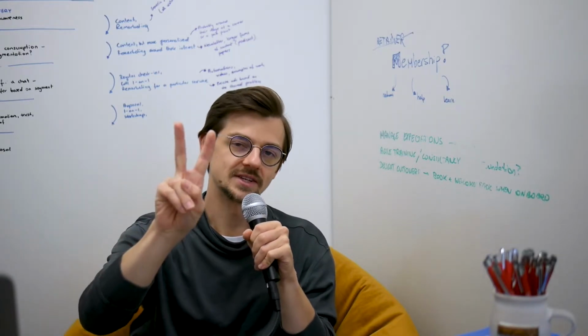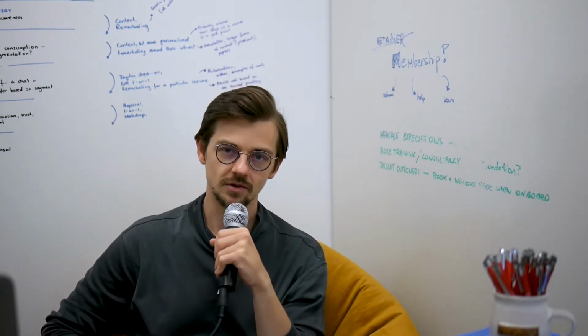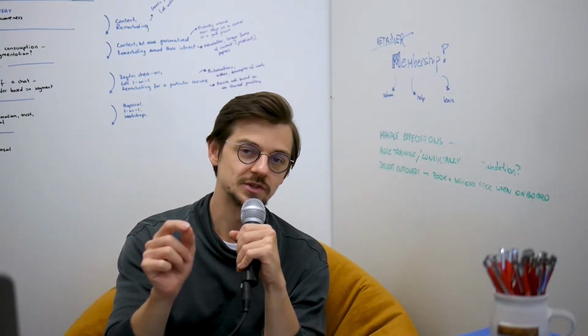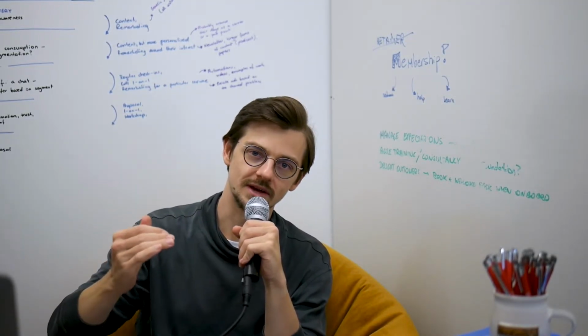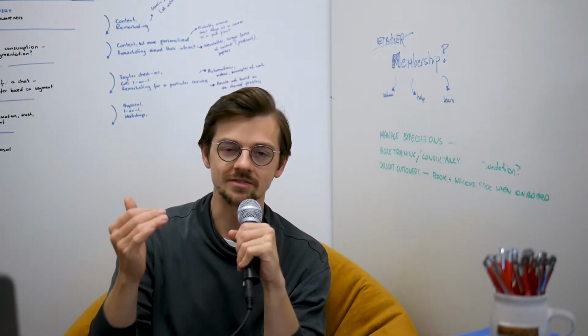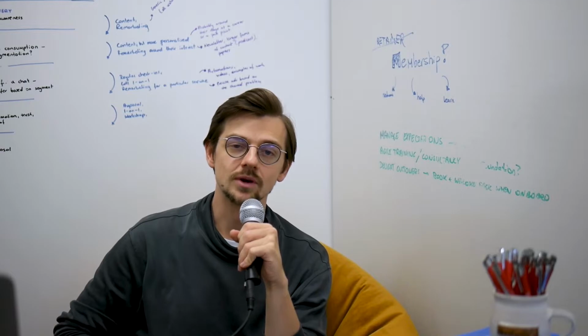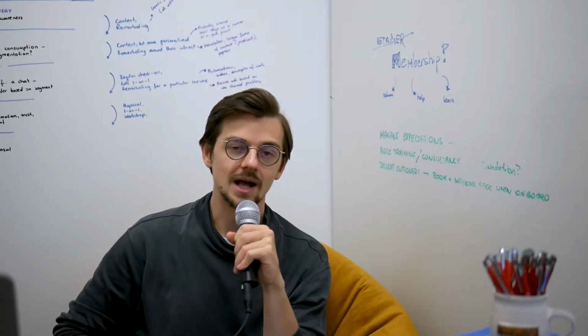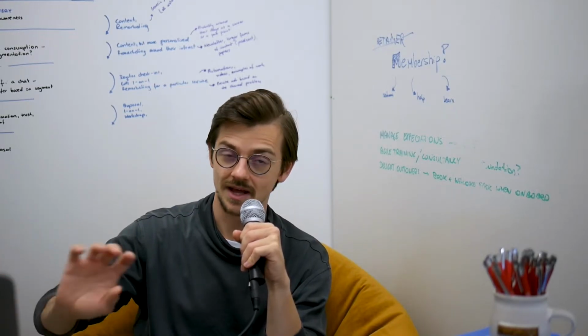So there are 2 things that we did here at NerdCow to fight that. First of all, we implemented a design sprint at the beginning of every engagement. So if you decide to work with us and build a website with us, we will invite you to a 5-day long workshop that will clear up the air, help us understand your business, and prioritize things. That's very important.